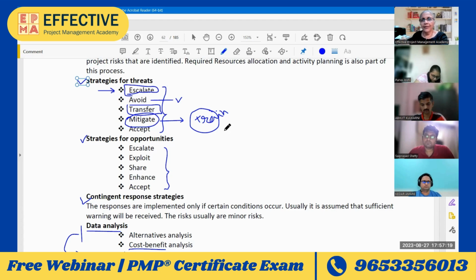Are you with me? It's not only that you reduce, you make the probability zero. You buy out a new component, the probability that the customer will not accept is zero. Impact of that risk now is zero. So basically what we have done is we have reduced the probability to zero and the impact to zero. So it's a special case of mitigation actually, avoiding.